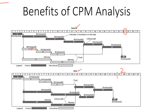The strategy to save time is to first identify your critical path. As a refresher, the critical path is the longest path in the network and it indicates the total time to complete the project. Here you can see activities one, two, three, four, five, six, and ten comprise the critical path, whereas activities seven, eight, and nine are non-critical — and you can see we have got some float there.